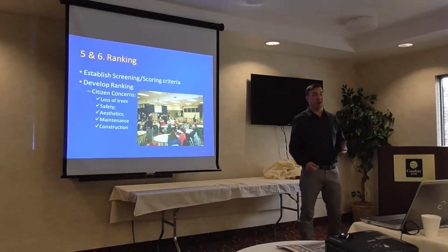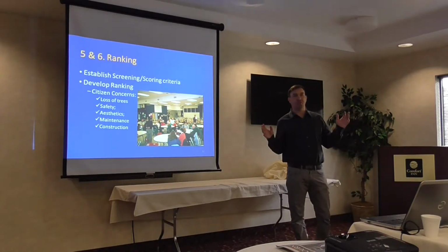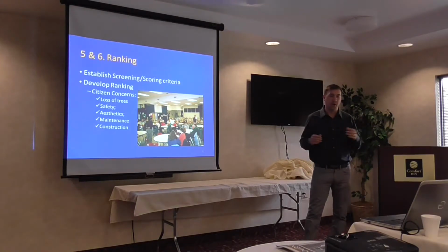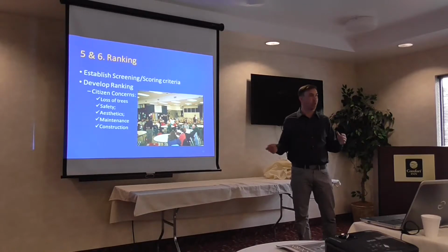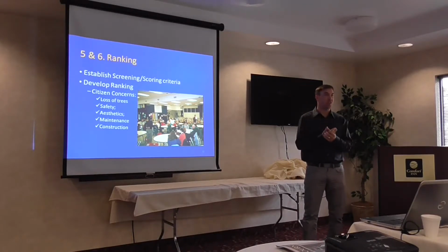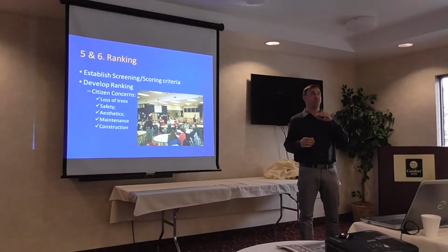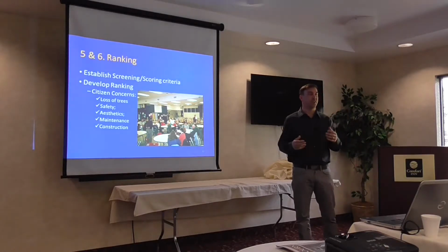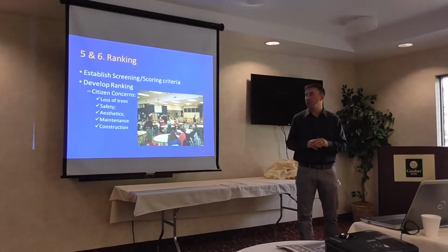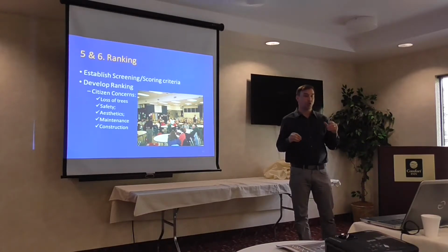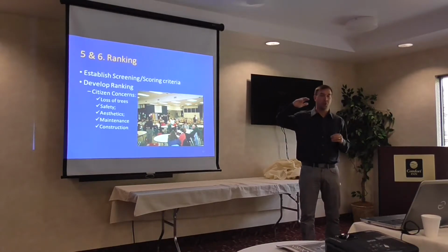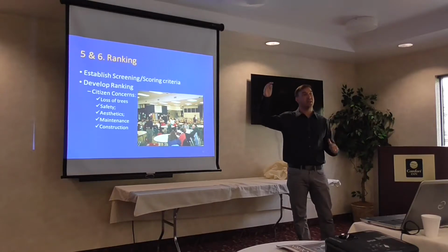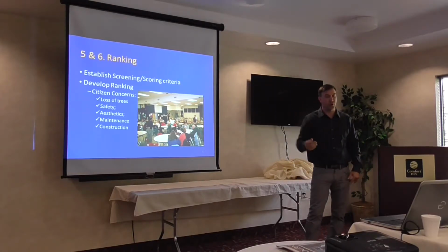The next part is ranking. So not all the projects are going to be good. Some will be ones that are maybe small, but if the opportunity comes up, it's worth doing. Other projects might be, hey, this is a great project. We should use some of our funding to build it, and let's get to work on it right away. So this may be based on your own local ranking criteria. So it doesn't necessarily have to be just how many pounds per dollar spent. I mean, that may be what you're most interested in, and I would argue it probably should be.